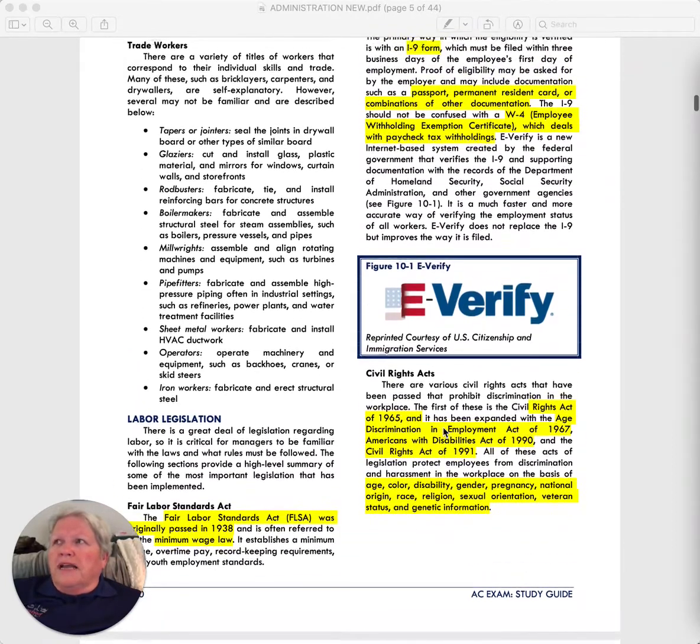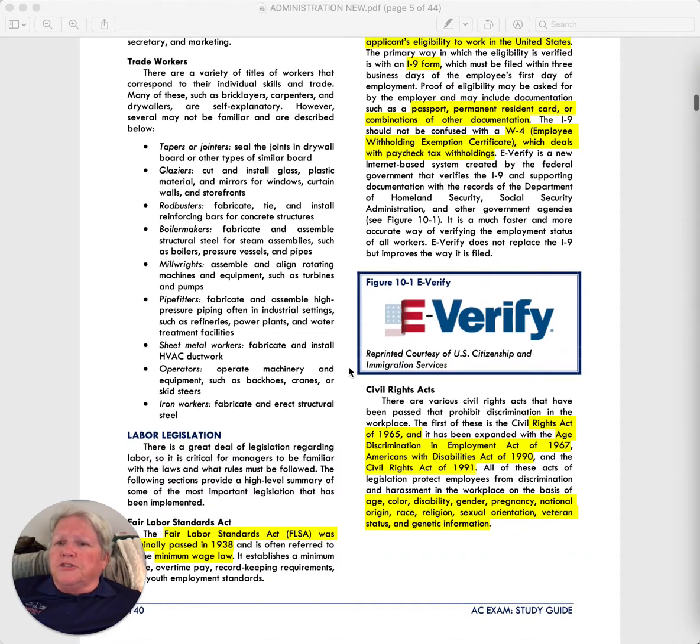It's typically done by area across the country, so the minimum wage rate for Houston, Texas would not necessarily be the same minimum wage rate for Brazos Valley or for Dallas, Texas. It depends upon the market that you're in, and they're generally published, and on federal and state jobs you typically have to abide by a minimum wage rate, which should be disclosed to every general contractor at the front end of the job when you are estimating it.